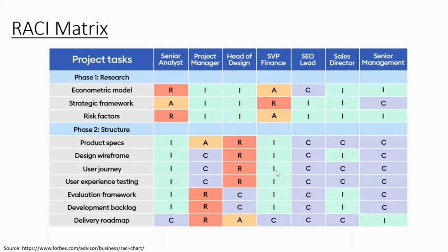Now, there could be a question: do we really need to create a RACI matrix in our project? Ideally, this comes into the picture when the client for which you're working is involved for the first time in this type of project with your company. At that point, the assurance level could be not as strong as it should be. So your project manager, it need not even be the business analyst, designs such a matrix and says that this is the work assigned to us and this is how we are going to do it.